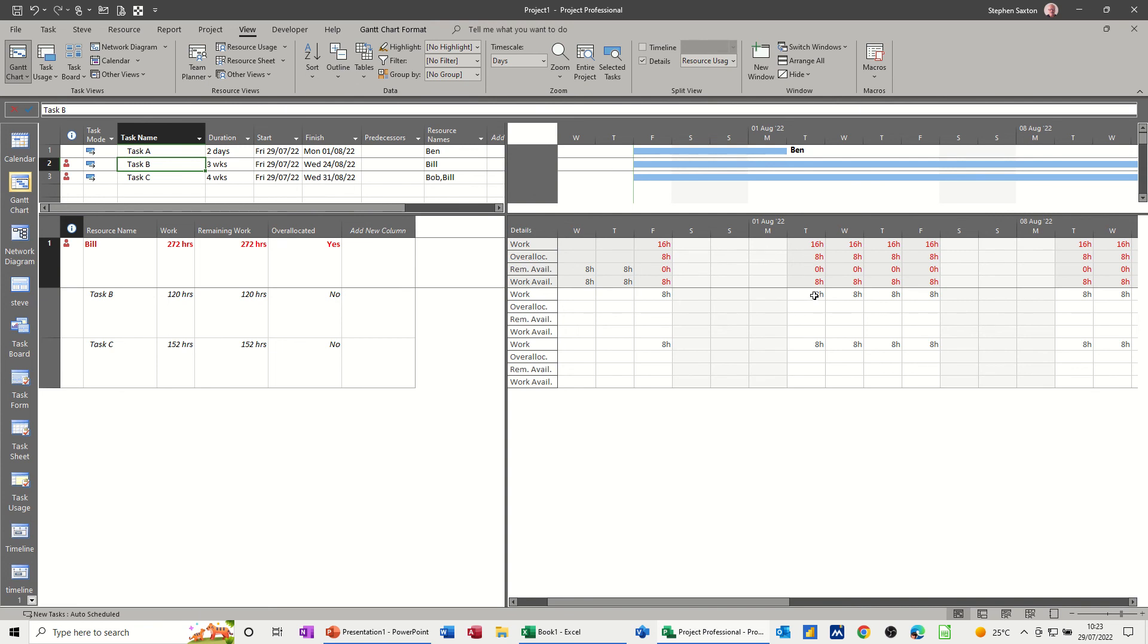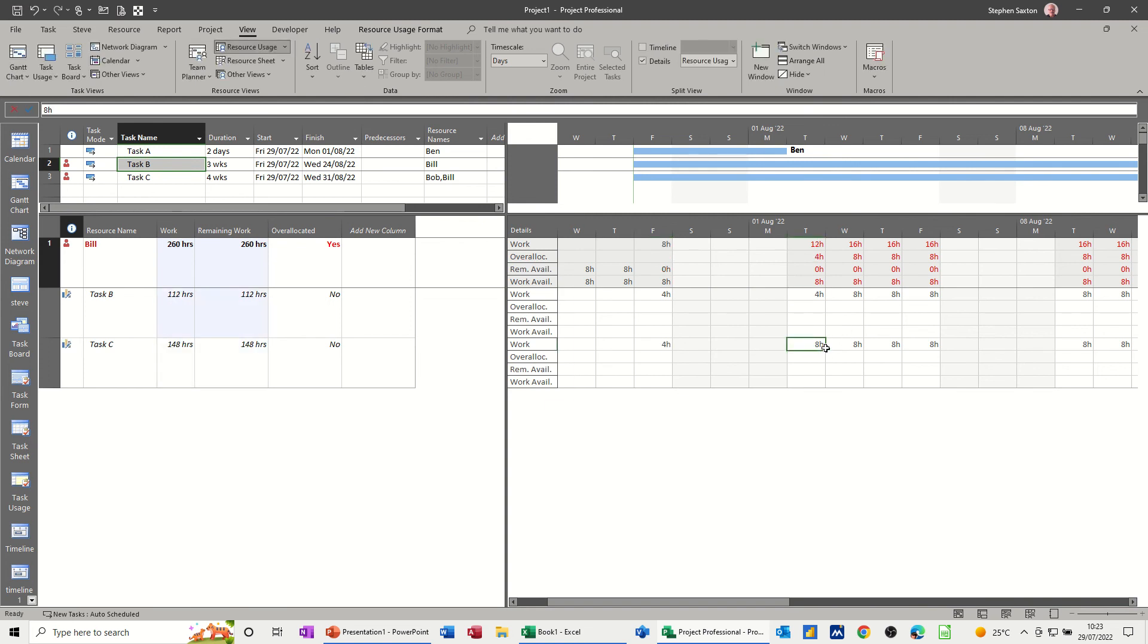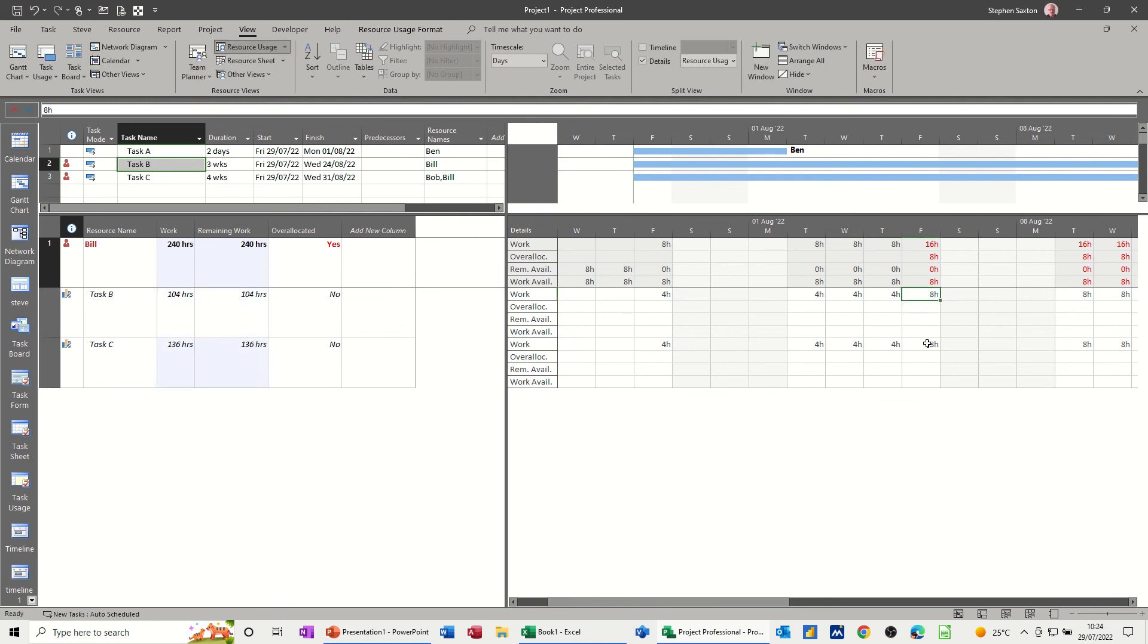So I could, let's just change some of this. If I put that down to four and four, so that's now going to fix that, because he can do that. Four, four, four, four. And this is what you'd have to do.